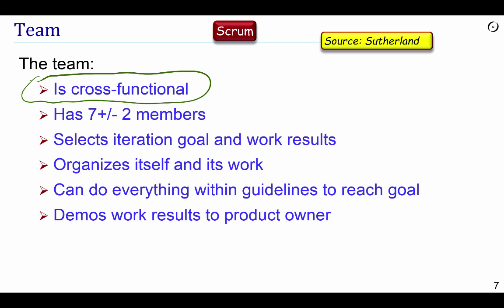In the Scrum view, we have a list of tasks to be fulfilled for a certain iteration, and whenever someone becomes available, he or she takes one of these tasks. We want essentially anyone to be able to take on any task. That's what cross-functional means: no narrow specialization, no personal ownership of an area.